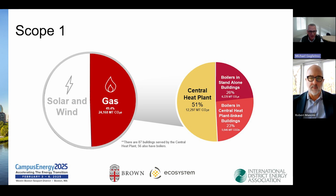So over 4 to 5 years of planning, we have continued to learn and adapt to new information. The initial plan, as I had mentioned, focused really on electrifying the central heat plant and modifying central heat plant buildings. Within the study, the electrification of the central heat plant brought about challenges with noise, space, ice, water accumulation, all you can imagine with just trying to push that much energy into one location. Additionally, we knew the Jewelry District and independent boilers needed to be accounted for at some point. That was not considered in our initial plan.